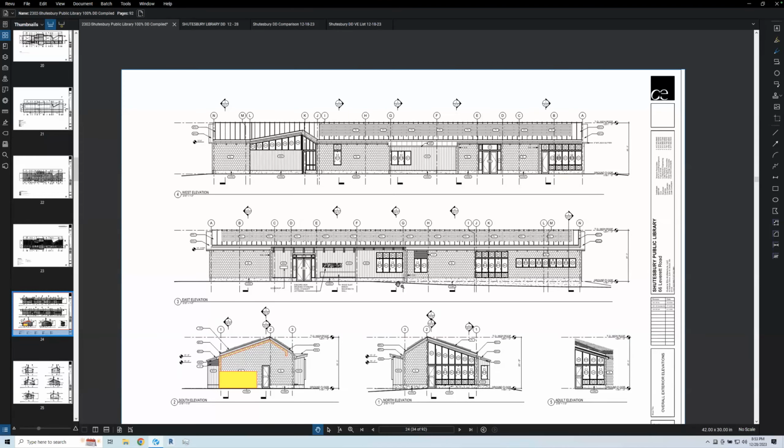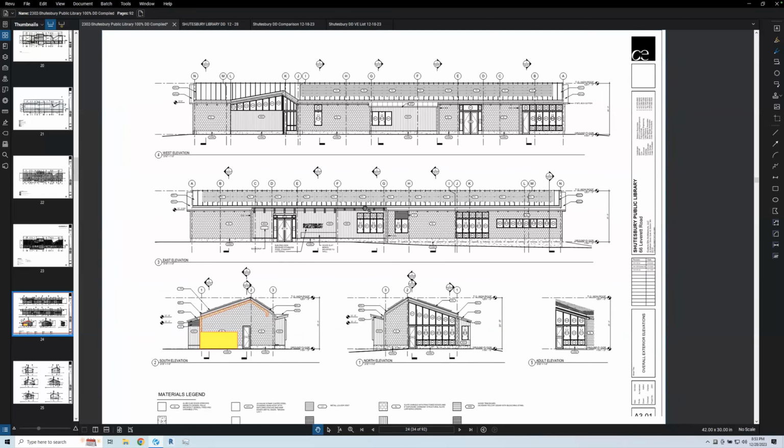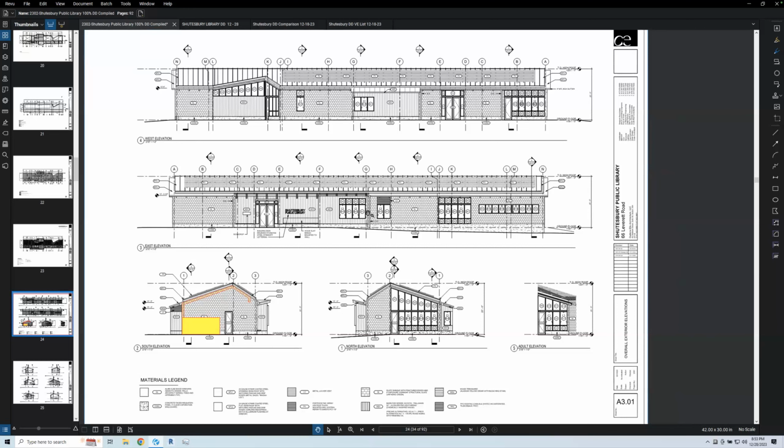So there are a couple of things. Neil hasn't had time to go through it all carefully and really look at the budget. And there is the well that wasn't in the budget. So what we really need is to have Neil go through the budget, and then we need to know what are eligible costs and what are ineligible costs, because that is what our budget is. And there are other small things like those granite benches, which was another $20,000. There are a lot of little picky things, so we really need that full total project cost. We need more time right now for Neil to go through it and come back.